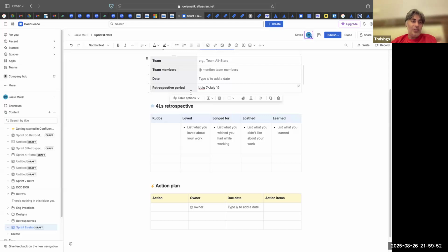They will have all sorts of nonsense on Friday afternoon. Monday also, people are late and all that hodgepodge is going on. So typically start your sprints on Tuesdays and Wednesdays, and end them also on Tuesday, Wednesday, Thursday, somewhere in the middle. So if they ask you when do you start your sprint, Wednesday, when do you end it, Tuesday, whatever is the 10 or 15 day gap. So don't say it on Friday.